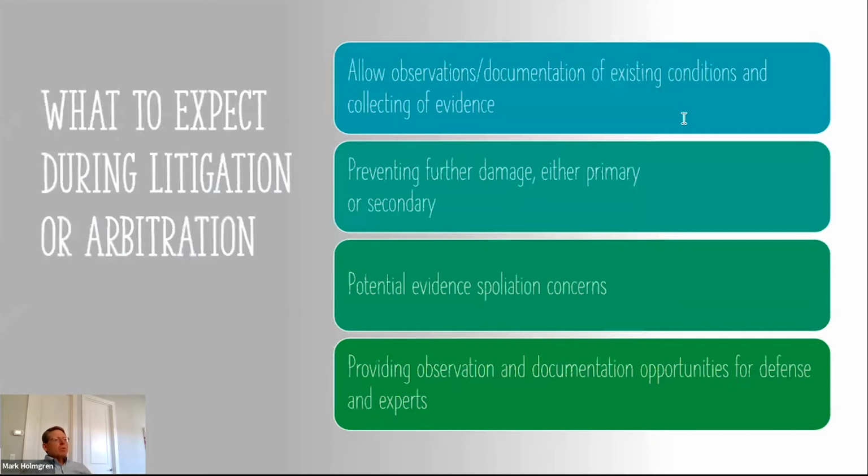So if we go back to the CC&Rs, like I said, they all have an alternative dispute resolution provision. There's a lot of commonality between them. Generally speaking, most of them call for the association to send a notice letter to the developer, which then triggers a right for the developer to perform inspections and repairs.